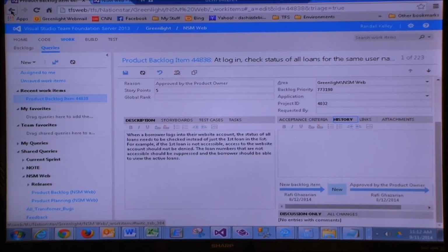And I think probably people get more adventurous when they get the story points, the hours and all that. When they had waterfall, everything was like big sum, money. Well, it's very project driven. I want to get this done, here's my project, and I tell you, okay, that project's gonna cost you 70 development hours, the blended rate is $70. It's gonna cost you that much money, is that gonna get you a benefit or is it a regulatory reason? Then the project gets approved, and then you go through your analysis, FRD, and everyone's billing hours to it, and someone's tracking a budget. In this particular environment, we don't have any of that transparency. It's just, to your credit, you're getting work done, it's just here, get work done.